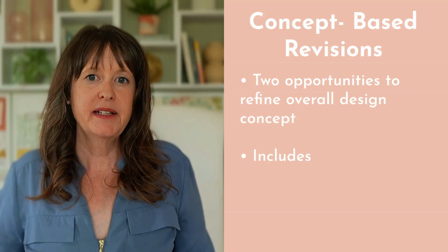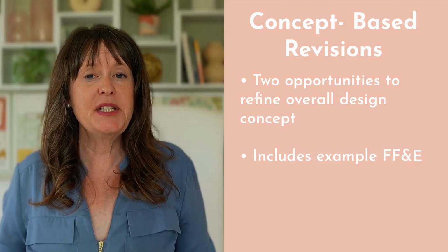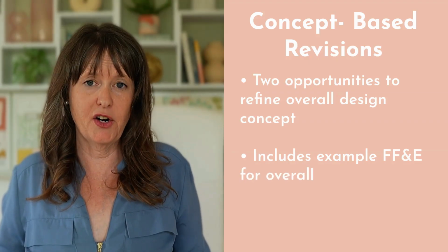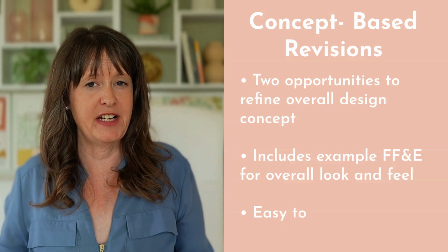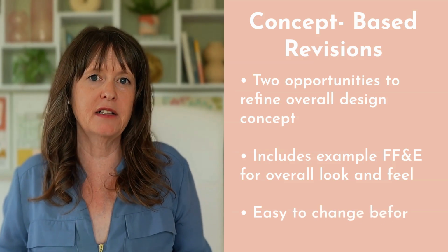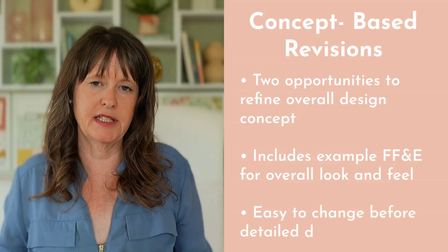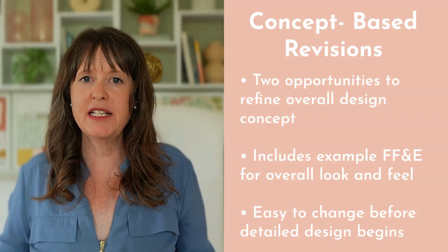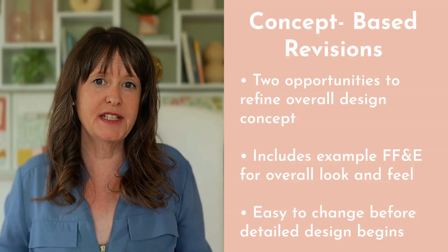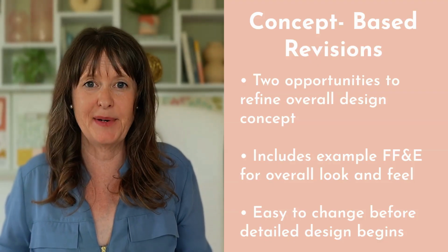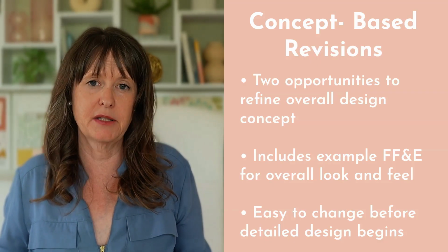Now under this definition, what you do is you design an overarching concept that may include some example items of FF&E that gives an overall look and feel rather than being a detailed design. So at this point, if the client is not happy with the design direction, then you can easily change the concept without having spent hours and hours on detailed design and detailed specification.